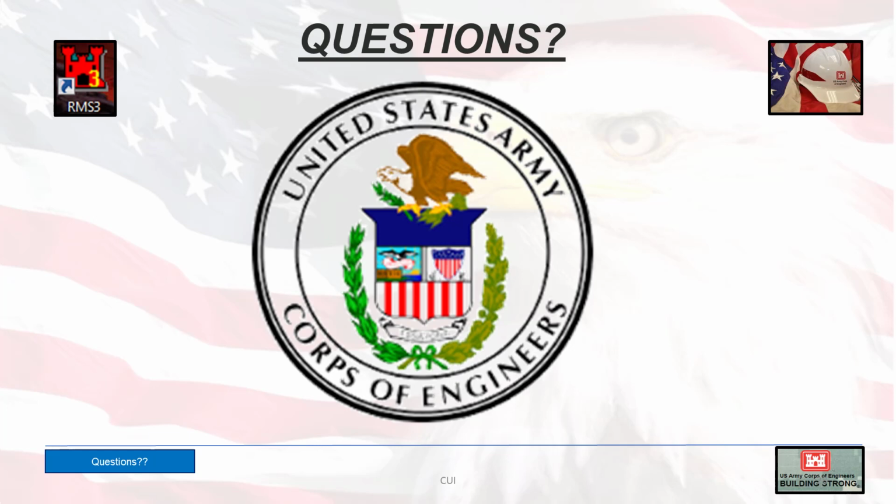But you do need to have one signature. CEFMS is requiring that one signature be present on the ENG 93 prior to it being sent to CEFMS. And it shouldn't prevent payment, although if it does come back from CEFMS with an error, you might have to go into CEFMS itself. But honestly, if you just go in and have someone sign it before they send it off, that will take care of it.